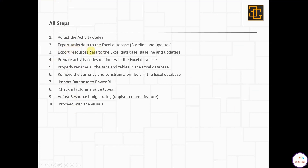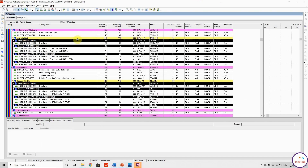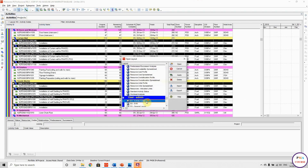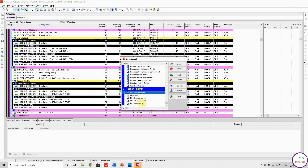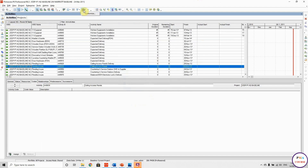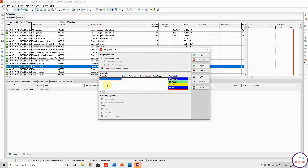Step two: export task data to Excel database for the baseline and the updates. Step three: export the resource data to Excel database for the baseline and the updates. Let me open the layout — this is the task table. I have a layout stored here with very basic information, zero customization.